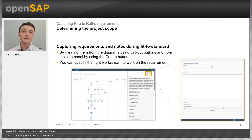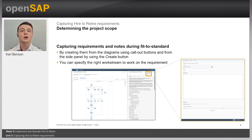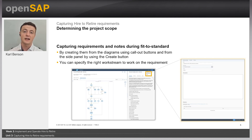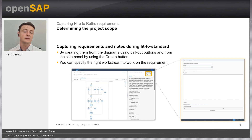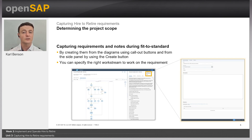Requirements in SAP Cloud ALM can be captured in a range of places, but the most important step in the fit-to-standard workshop is to capture requirements on the processes themselves. We can capture requirements on multiple levels. By clicking on a process to expand it, we can see the process steps involved. Clicking on a process or process step gives the option to create a requirement or a note. When creating a requirement, the first step is to give it a title, choose a work stream, set a priority, and provide a detailed description.